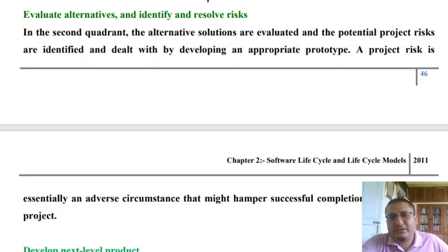So the next phase that we have after risk categorization is risk analysis, also called risk prioritization, where we try to determine the damage causing potential of the risk and the associated priority. Once the damage causing potential and the associated priority have been identified for each and every risk associated with the alternatives, we devise an effective containment plan. So how you're going to manage that particular risk.